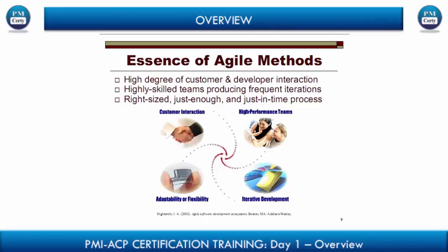How are we going to go forward with this large program or this very large project? So what we do is called scaling. If you have a very large project, we actually break up into many teams of possibly 12 or 10 or 5. Sometimes if the project also includes components which are specific to, let's say, embedded software or hardware or databases, we also build the teams around those particular core competencies, and we scale up these multiple teams to work either in parallel or sequentially depending on it. So this is how Agile works.